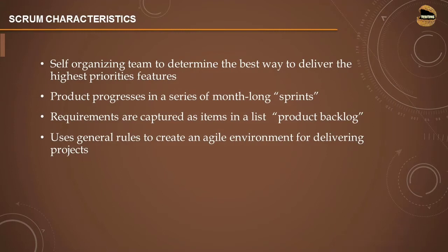The product progresses in a series of month-long sprints, depending on the type of iteration — lasting for a fortnight of 14 days or up to a month, typically between two to four weeks. Requirements are captured as items in a list called the product backlog. We will further detail how a product backlog is created, how tasks are broken down, and how items are picked from it for development and testing. Scrum uses a general rule to create an Agile environment for delivering projects.